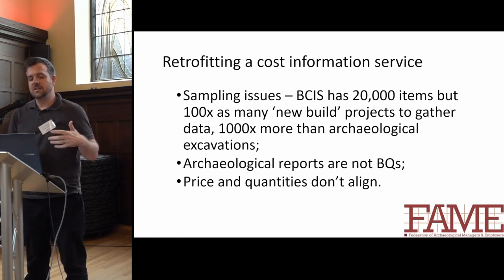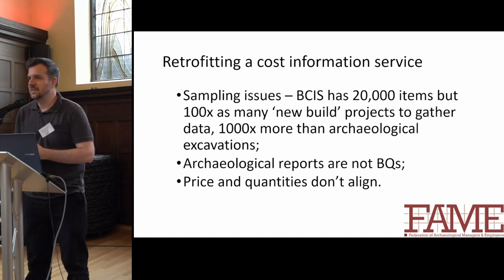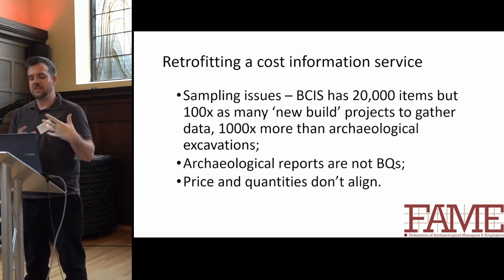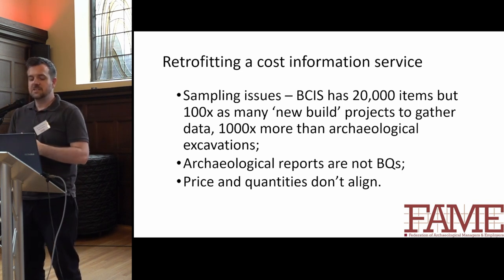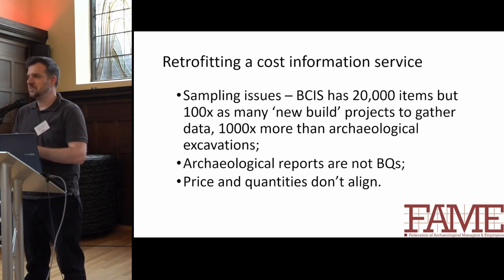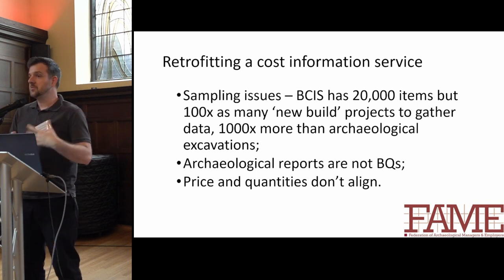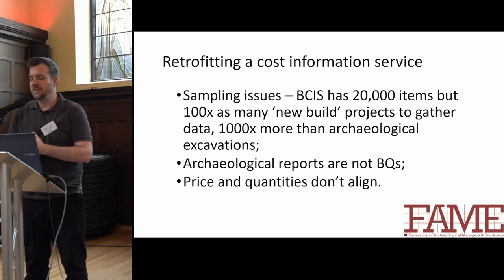Another issue is data in archaeological reports. The archaeological reports are not billed quantities, so it's actually really hard to pull out that information from them. And if you're not billing and putting things together as a bill of quantities, it's really hard to align those with prices. So essentially, the idea of doing a retrofitted cost information service we found is not going to be possible at this point. Going forward we might be able to use real live data to build it, but going through old reports and pulling this together is not viable.